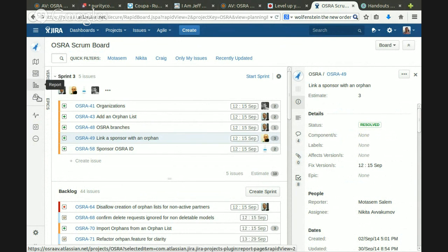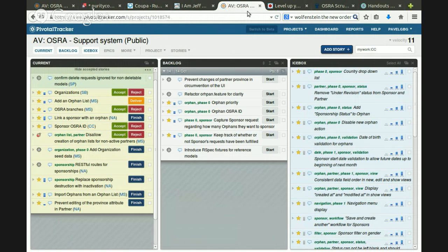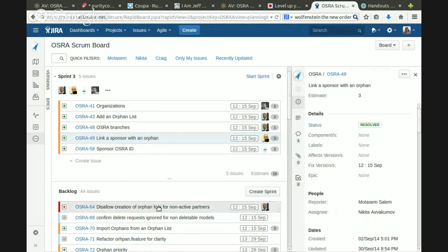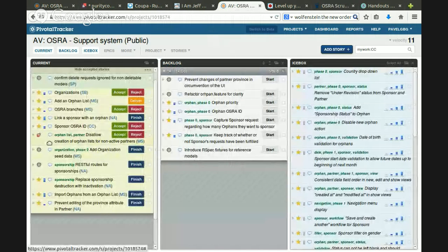So you can't work on that until we finish the other story, then, can you? I can. It's just that then there has to be an extra step in all the tests: after you create a sponsor, you deliberately set the status to active. So it would make much more sense to do that story first, where we get rid of the under revision status. Yeah.